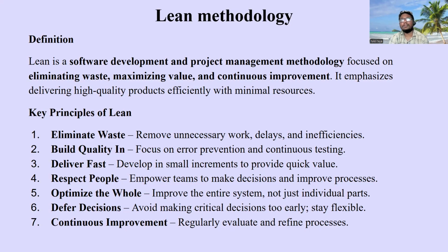The program increment planning call will be around 10 to 12 hours. Sometimes it takes a total day or sometimes it exceeds the day also. In sprint planning, it will not take more than 1 to 2 hours. Why? Because in sprint planning, you will be doing planning only for particular user stories.